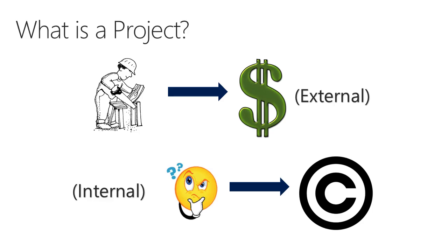All right, then we have those projects where you don't see direct revenue, and maybe you'll never see revenue. So you're doing this work potentially for internal benefit. I'd classify those type of costs only projects as internal. Some examples of that could be an addition to an existing building, so your company's adding on to their current building.